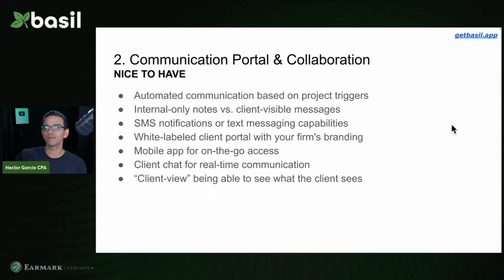Phase 6, work has been completed from an internal team member, waiting for approval from a manager or partner. Phase 7, report sent to the client, waiting for approval. Phase 8, client has approved it. Now let's go into filing or e-filing or closing the document or creating the final documents. Phase 8, closing out the task or the job or the project.